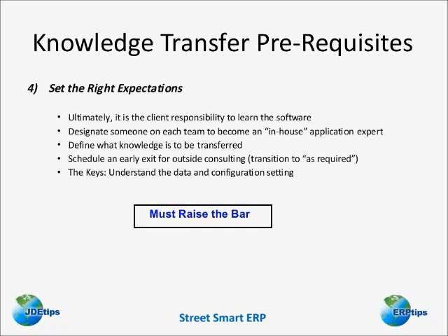Schedule an early exit for your consultants during the project. How about at the end of the design phase, we start phasing out the consultants to become an as-required resource? Now, obviously, when you can do this is a function of the quality of your team, how much they're learning, the pace of the learning, because obviously you don't want to do anything stupid.